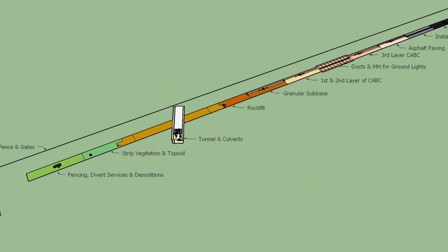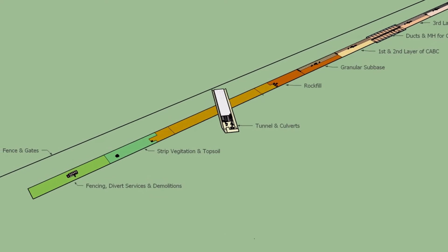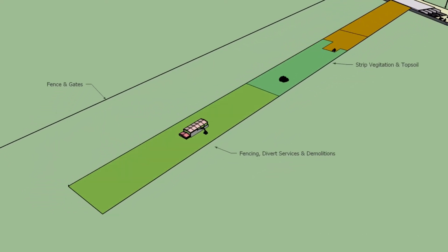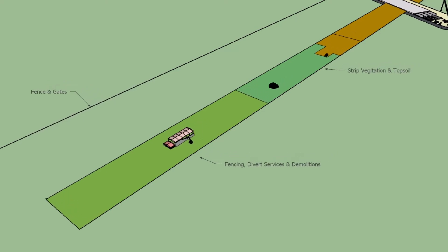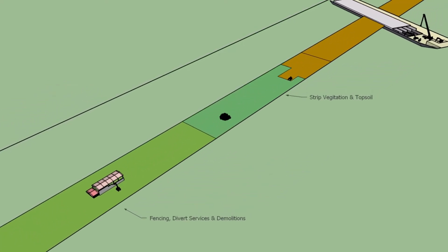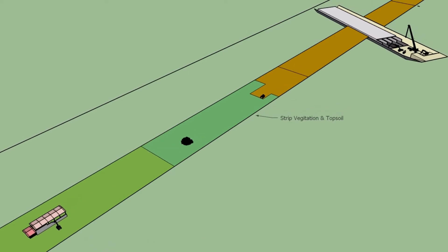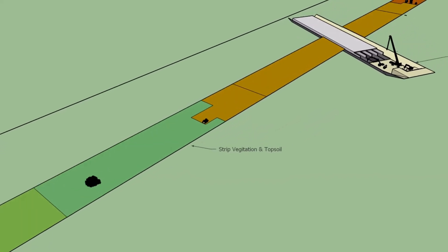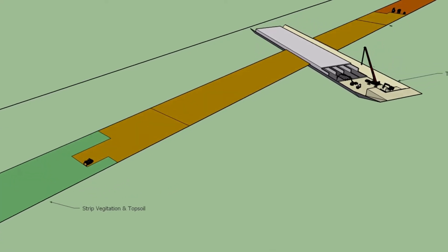The sequence of work activities are as follows. Fence off the area and provide access gates and security huts. Divert underground services. Demolish any structures. Strip vegetation and topsoil and remove.